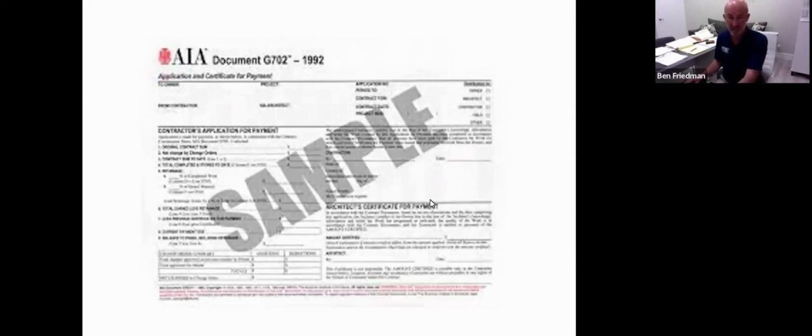additions, and deductions. So this is where we're going to keep track of if there's a change order, we're asking you to pay in anticipation of this change order and getting that approval before we take it upon ourselves, or before a board member says, hey, can you go and do this for us? This is now certifying that we have a request for a change, whether it be an addition or a deduct, and someone from the association is signing off that this in fact should take place.